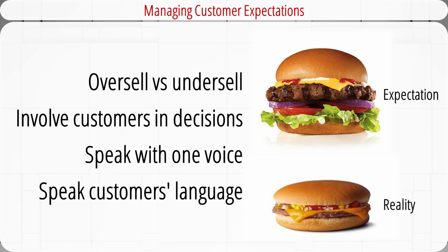Project managers must be skilled at managing customer expectations and perceptions. A proactive approach is to shape the proper expectations up front. Experienced project managers have been known to lower customer expectations by underselling projects. If the estimated completion time is 10 to 12 weeks, they will promise to have the project completed within 12 to 14 weeks, therefore increasing the chances of exceeding customer expectations by getting the project completed early.